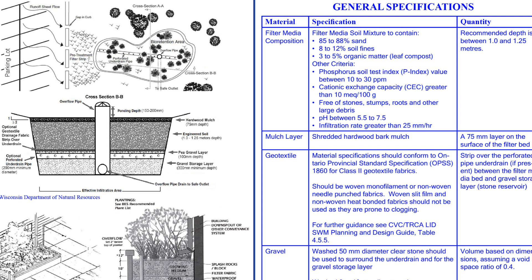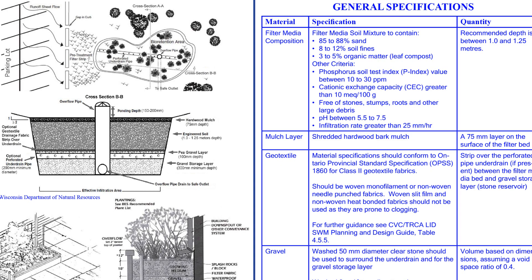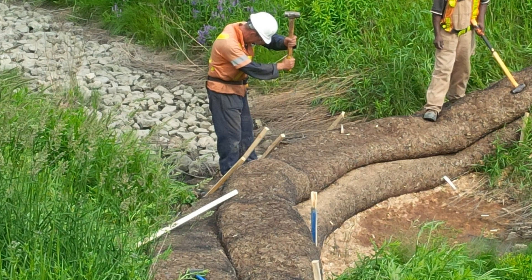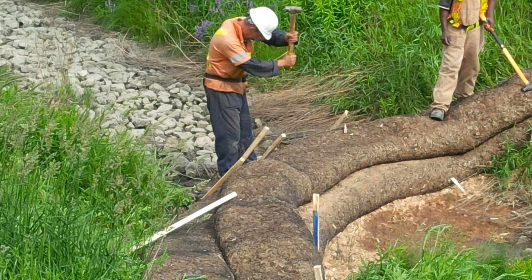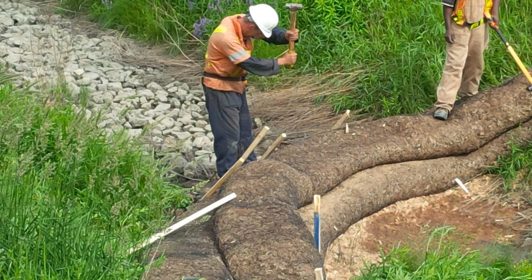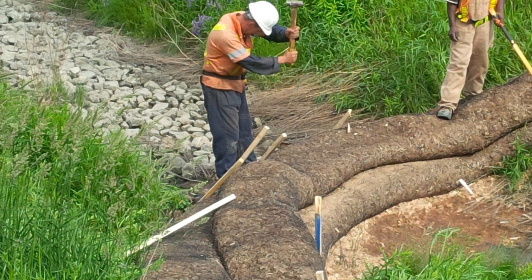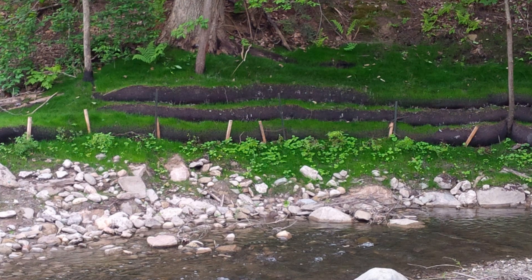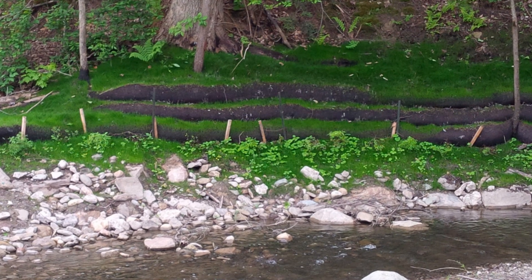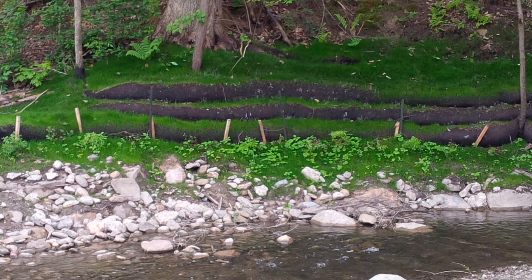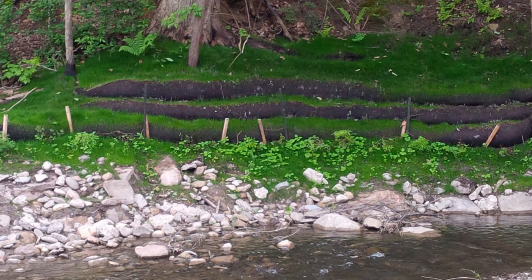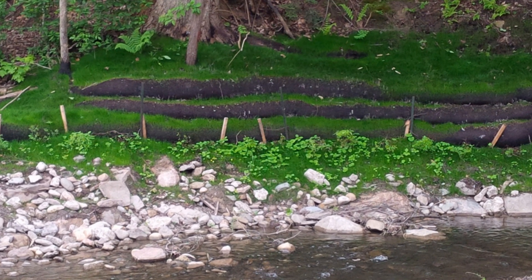It's a lot easier to address any issues during implementation than trying to make repairs or changes post-construction. Detailed material specifications should be included in the construction notes. It's important to make sure you have the correct materials at every stage of construction. The drawings and notes should also include installation and sequencing areas, as well as an erosion and sediment control plan that protects both the area adjacent to the worksite and construction materials stockpiled on-site.